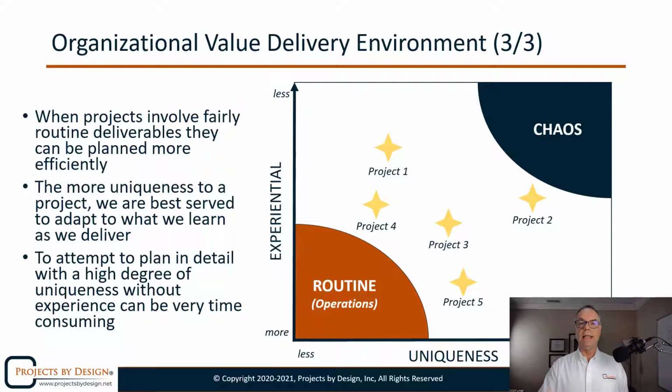So when we talk about projects with a high degree of routineness, we're simply doing the same thing that we've done before, a network refresh or a building that we're building, maybe with a different set of requirements, but the construction crew is very experienced and they've done this sort of building before. These things are more routine, and therefore we can take a plan-driven approach.